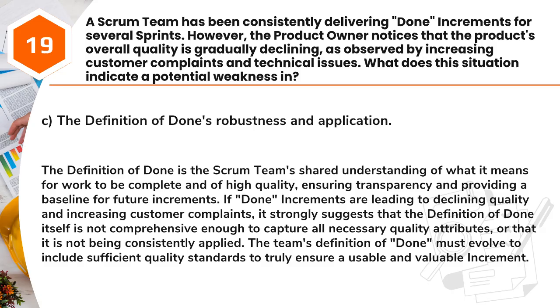If done increments are leading to declining quality and increasing customer complaints, it strongly suggests that the definition of done itself is not comprehensive enough to capture all necessary quality attributes, or that it is not being consistently applied. The team's definition of done must evolve to include sufficient quality standards to truly ensure a usable and valuable increment.